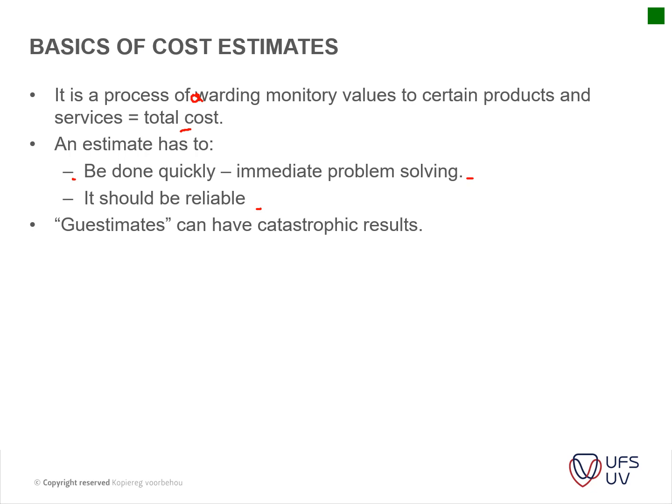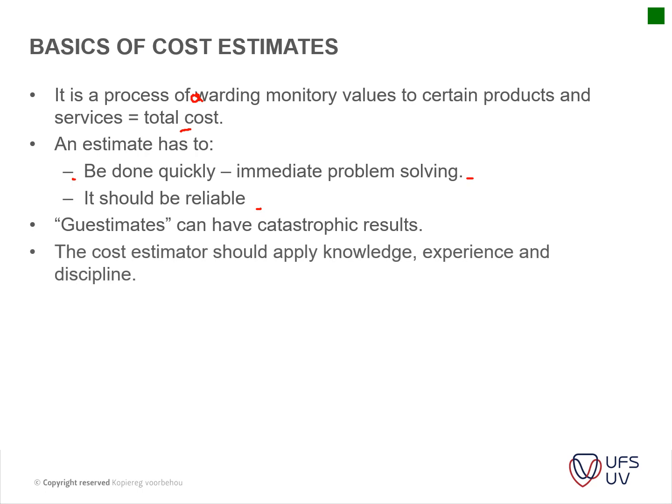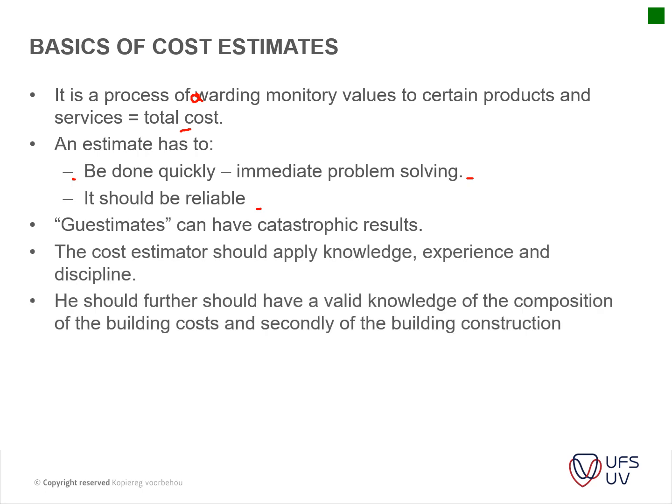Guesstimates are a big risk on a project. One has to sit down and look at all the possible influences on the project. The cost estimator should apply knowledge, experience, and discipline. He should further have a valid knowledge of the composition of a building. Basically, he just needs to understand that if you take out this wall, it might not necessarily save money, because now you suddenly have to put in structural reinforcing in the ceiling to open up this space. So that's the basics that the cost estimator has to look at.